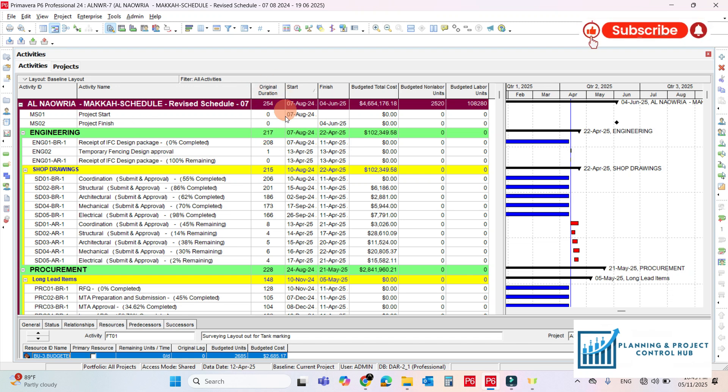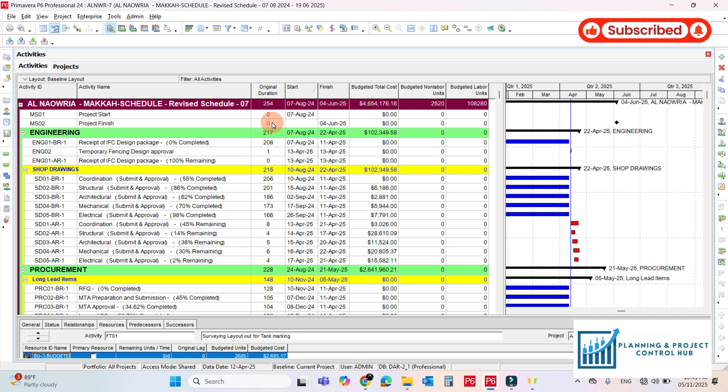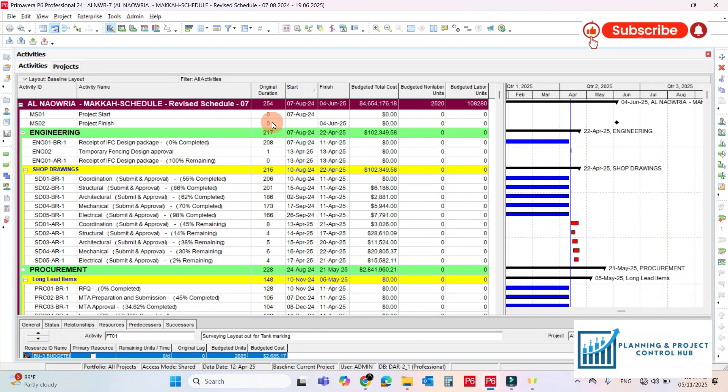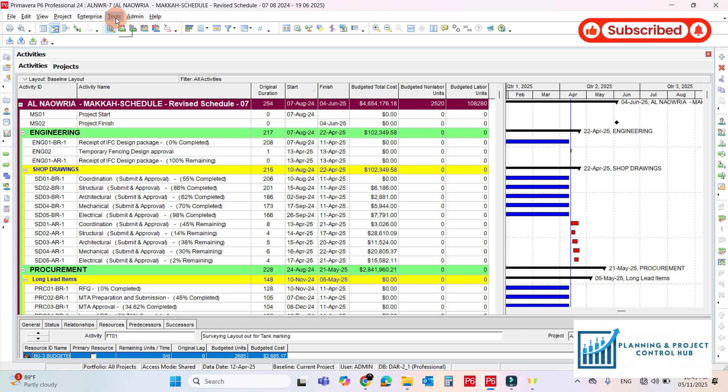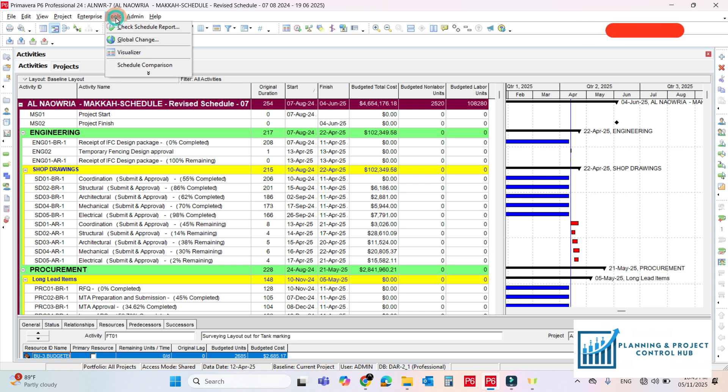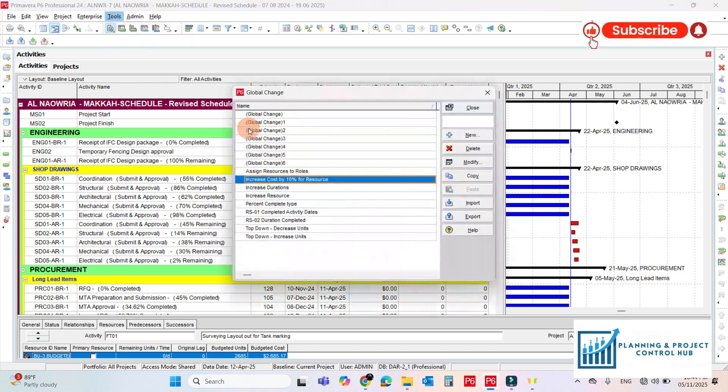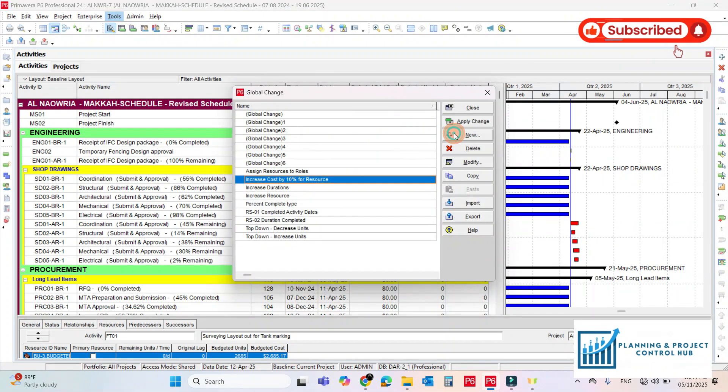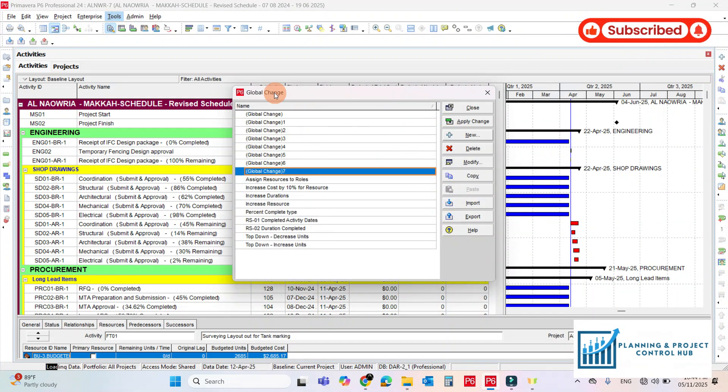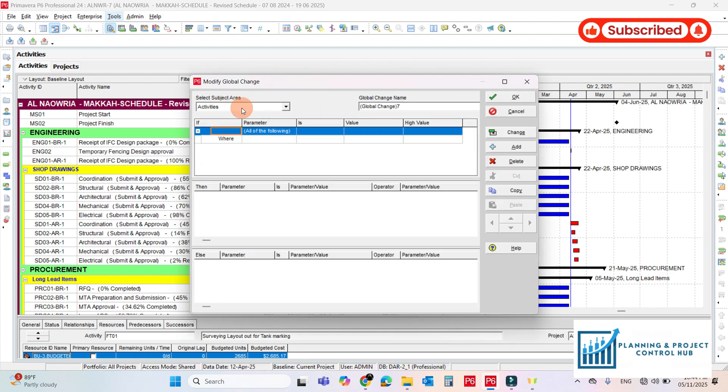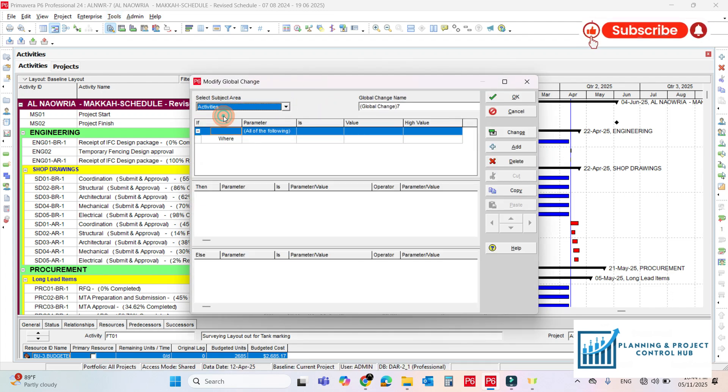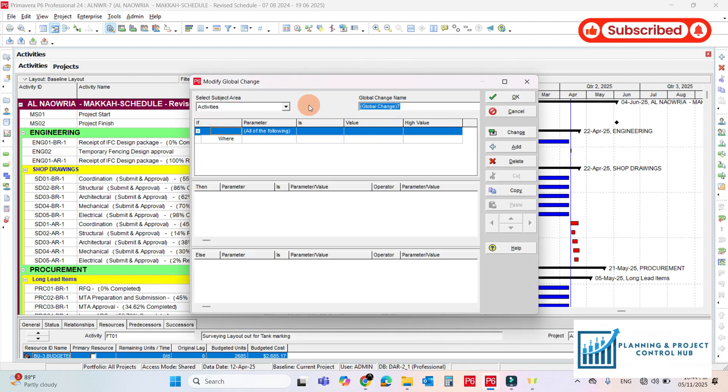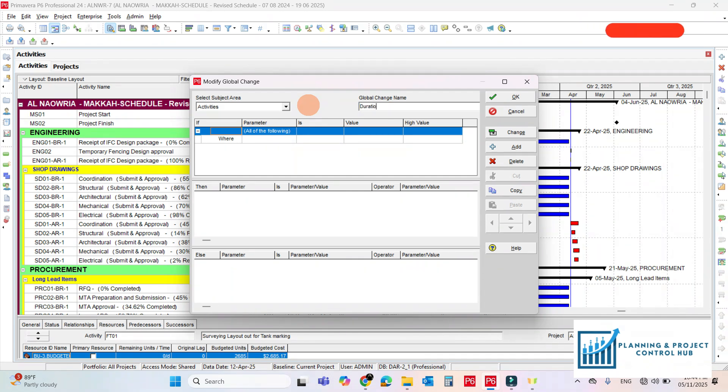So just write down the duration here, it's 254. Now we will reduce the duration only for the not started activities. Come here to the tools, global change, and new. Should be activities here, just rename it Duration Reduction.